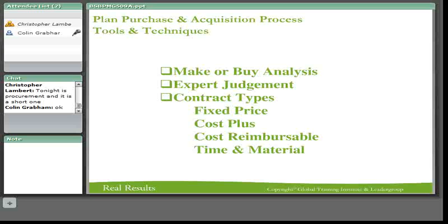So we put out the tender for a second time. And we said what we would do is look at your cost price plus a percentage, and the vendor was happy with it. Yeah, so we negotiated it. There was nobody else, so we could see what it was costing them.